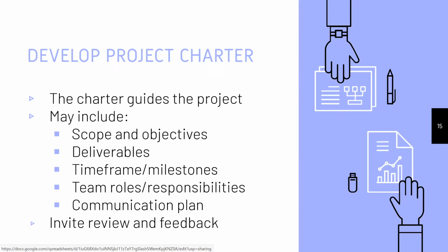So you should be writing the charter as you plan the project. And the charter is intended to be an internal planning document. The audience for the charter is mostly your project team and, in our case, library administration. Invite review and feedback from your team and from administration. It's an iterative process, and it should be a flexible document. The charter is a very high-level view and summary of the project, and it should allow flexibility. So next up is Mark talking about project risks.